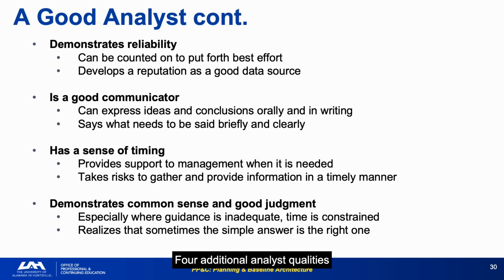Four additional analyst qualities: reliability, communication, timing, and common sense and good judgment define the professional behaviors that determine whether analytical insight actually reaches decision-makers in time to matter. A half analysis an hour before the meeting is better than a complete analysis an hour after it is done. Timing is a professional competency, not a personality trait. It requires knowing the decision calendar and building analysis work backward from it.